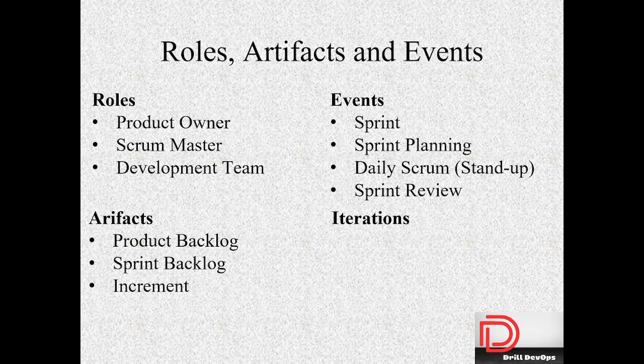Probably what I have seen is that 2 weeks is the ideal time. So a 2-week sprint will be there. If they start on this Monday, they are going to review the entire sprint on the alternate Monday, which gives you a 2-week sprint duration. That is how they are going to work and provide a shippable product or a deliverable product at the end of each sprint. And if you calculate over 10 sprints, which spans around 20 weeks, considering each sprint is time-boxed at 2 weeks, then you can see a good, high-quality delivered product at the end.